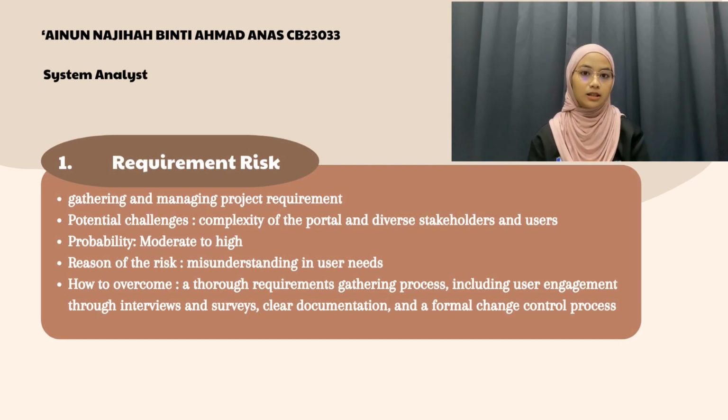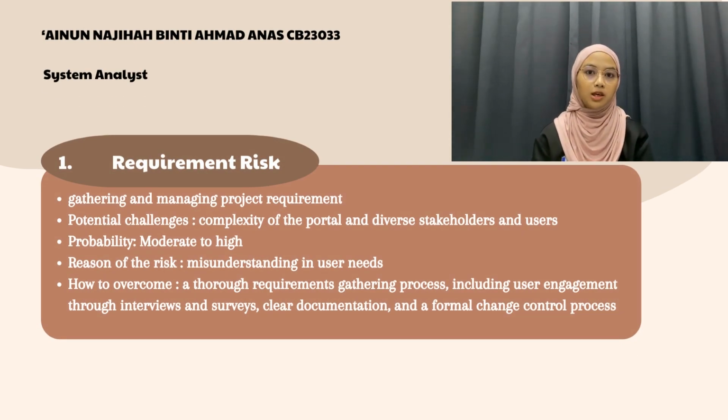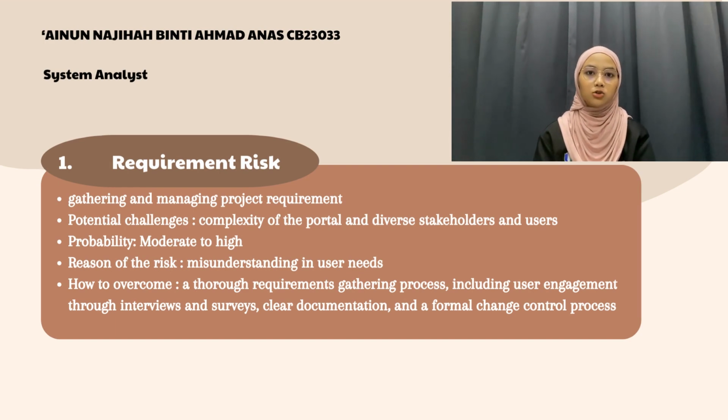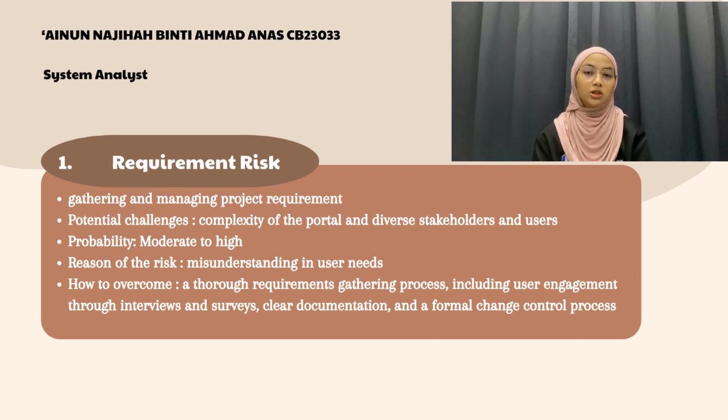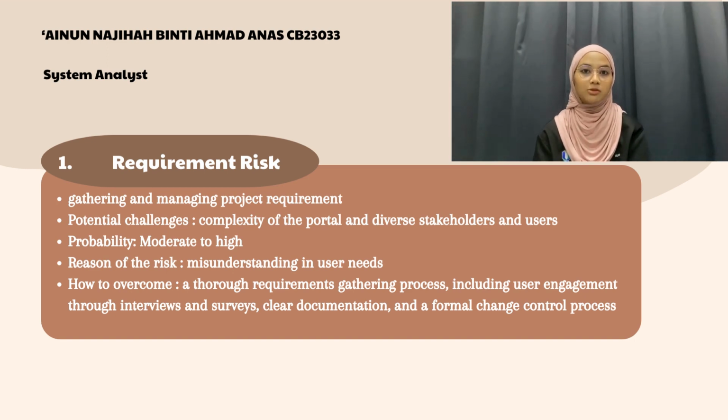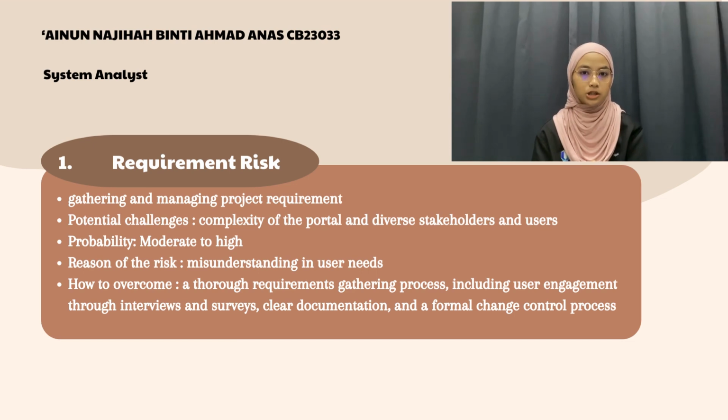As a system analyst, requirement risk in the MBK portal is significant due to project complexity and also diverse stakeholders and users. This complexity can lead to misunderstanding and changes in user expectations, potentially causing delays, increased costs, and dissatisfaction. To manage this, a thorough requirements gathering process involving user engagement and clear documentation is crucial.